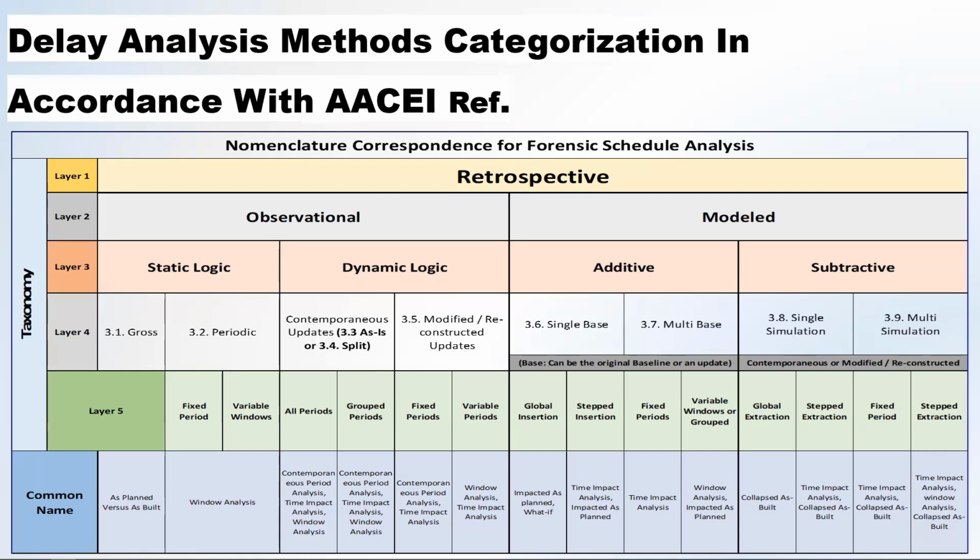When we go to layer number 3 in the observational methods, we don't use fragments, and we go for either static logic or dynamic logic. Static logic dictates that you do a baseline, and this baseline contains a certain sequence and structure, and you will keep this structure and sequence all across the project life cycle.